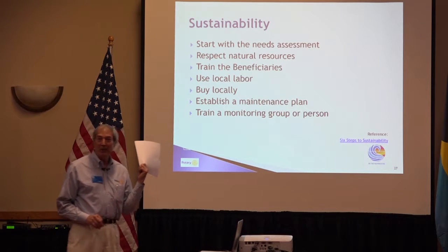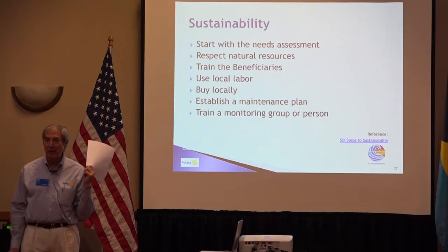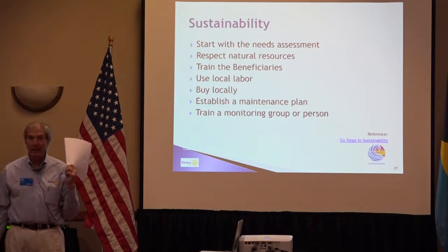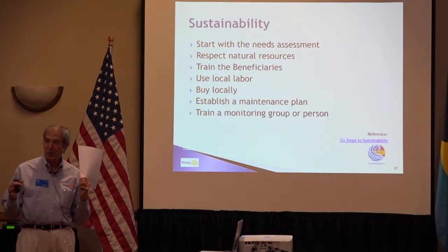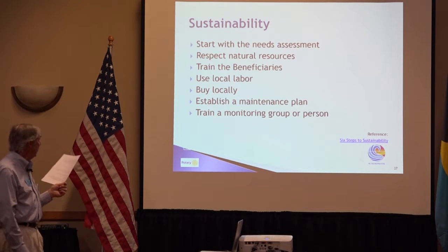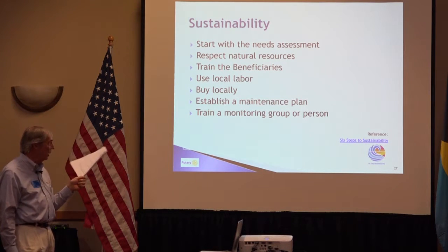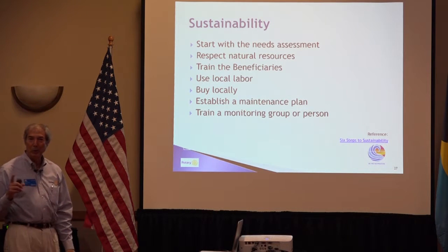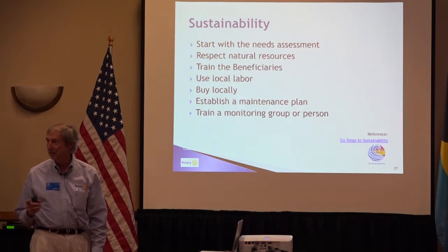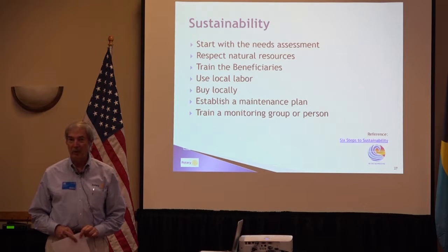Buy locally because that way they can buy it. When they need replacements, they know where to go. And you're going to get stuff that's maintainable. Establish a maintenance plan and train monitoring people. People who can tell whether your equipment is working or not, so they'll know before it's broken.